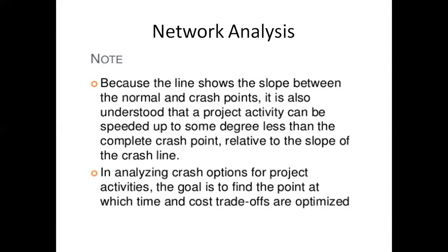Say activity A to B takes 8 days before crashing, and after crashing it is 6 days. So we are saving those 2 days, but we are not eliminating any activity. We are just reducing the time so that we can complete the whole work within a lesser amount of time.